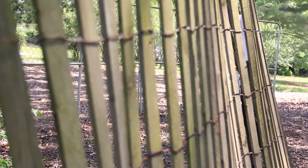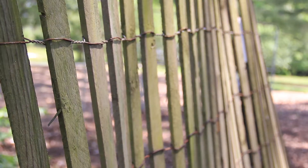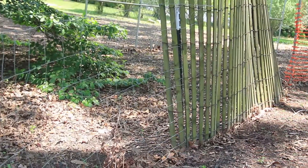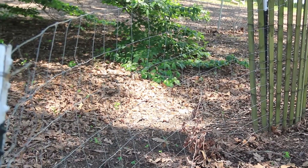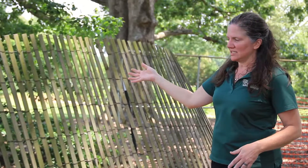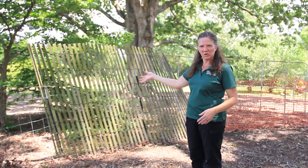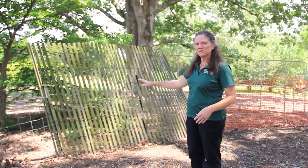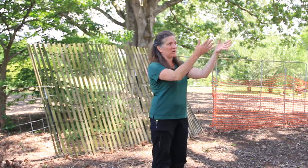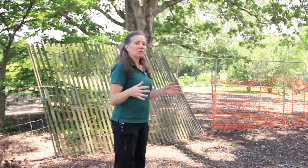Then there's what makes me think of snow fencing or drift fencing — that gets a little more protection and would be a little more difficult to get through, but still not the greatest choice. And then you have just fencing like you could pick up at a local farmer's supply store. Again, fairly easy to get through. Is it better than nothing? Sure, but it still leaves the site pretty accessible. These three options are all set up at the minimum distance you'd want to maintain if doing construction around this oak I'm standing under.